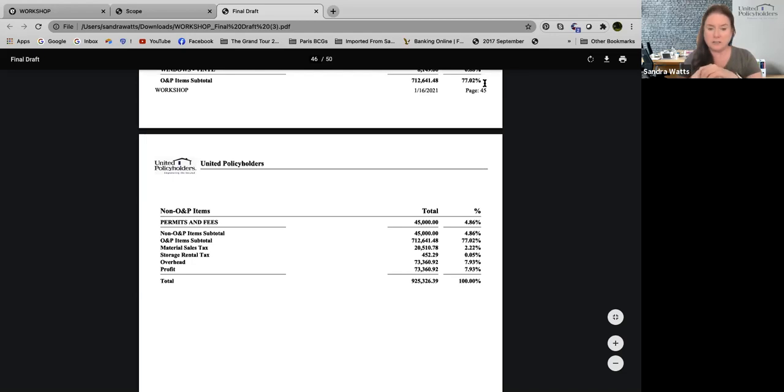If you haven't hit the limit, then you should add that on with your little red pen to your estimate and include it. Anything that they've left off, it goes without saying, I haven't said it, but anything that they've left off the estimate, put it on there. And I mean, I've talked to people who they've left off entire rooms. She's like, I have a 4-bedroom, 3-bath house, and somehow I got a 2-bedroom, 1-bath estimate. So, I mean, there's people that leave off whole rooms.